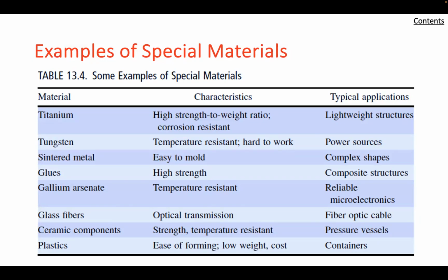When engaged in rapid prototyping, the term rapid means that adherence to strict quality standards, normally a full part of the system development, is suspended. So you're trying to get a quick look by seeing an actual test article, giving you a chance to explore and think about where you are with the components at that level.